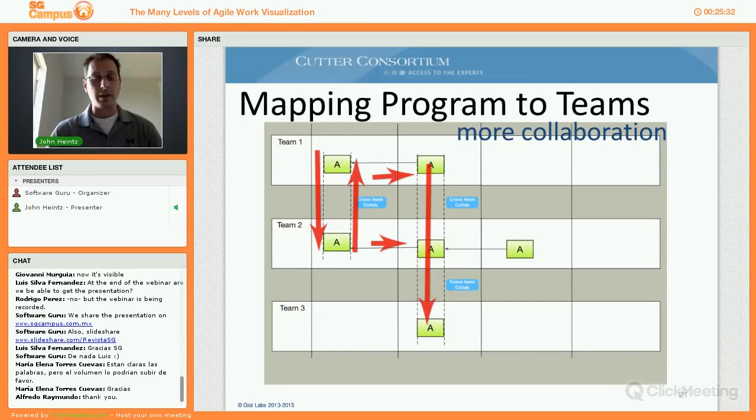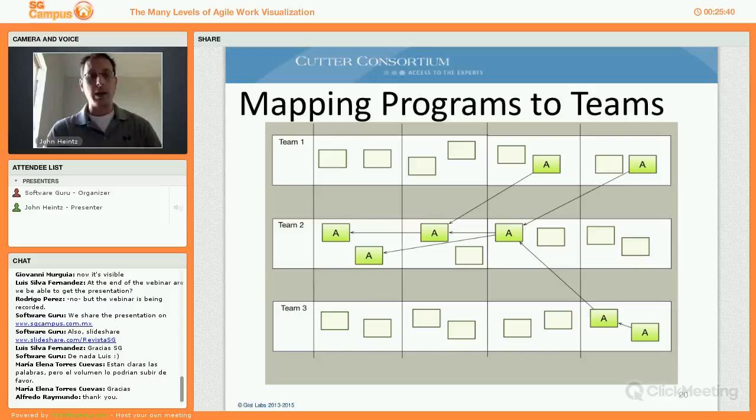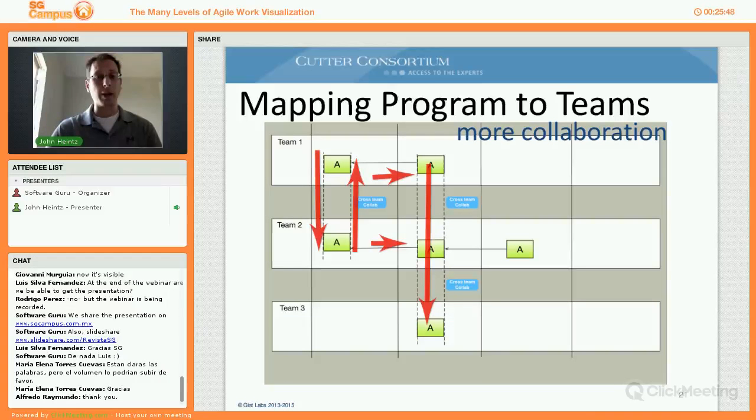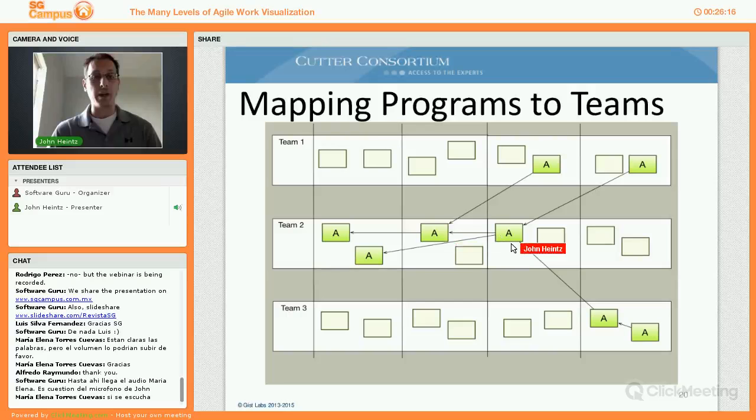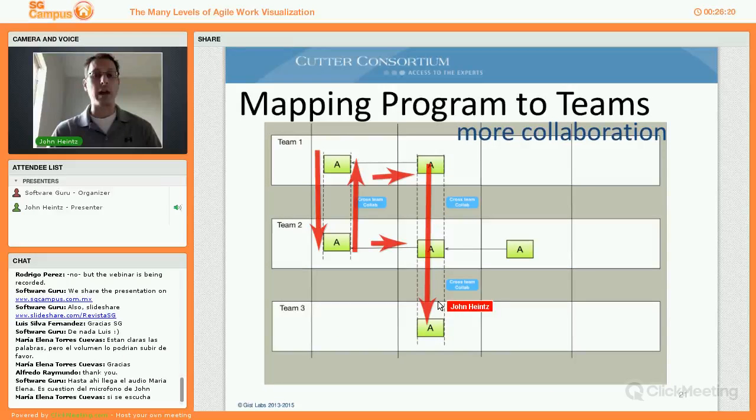There's something that I wanted to highlight in this context, is that if teams are working in a more collaborative sense, if I jump back to the previous picture, this is a less collaborative approach where work is sequenced with handoffs. This approach is more collaborative where work is done collaboratively together at the same time. One of the main consequences of this is that it is possible to have shorter calendar schedules with a more collaborative approach. Teams are not waiting for other teams, but instead they're working together more. Being able to show these 2 styles of work provides either a buffer in case something is delayed, or it provides the ability to have a shorter schedule, a shorter number of sprints, in order to be able to accomplish all of Project A more quickly.